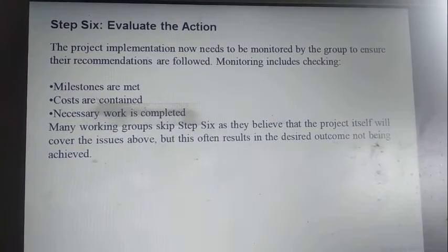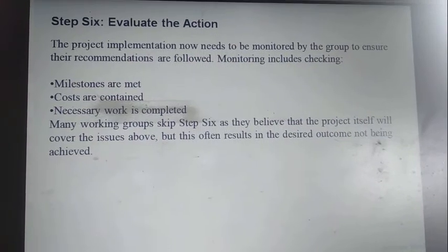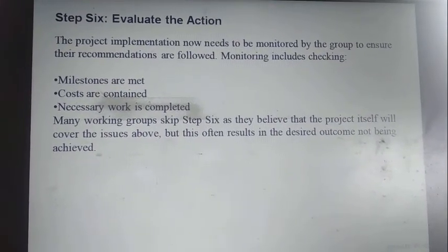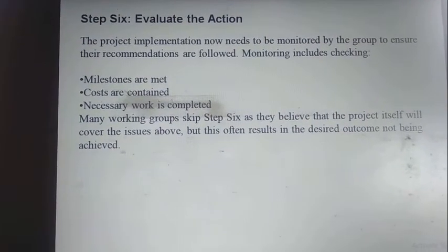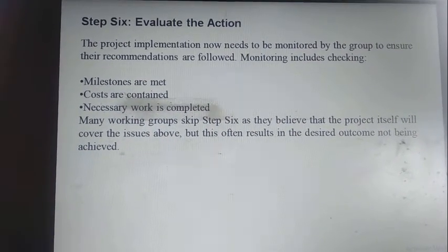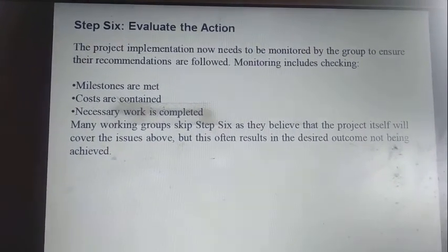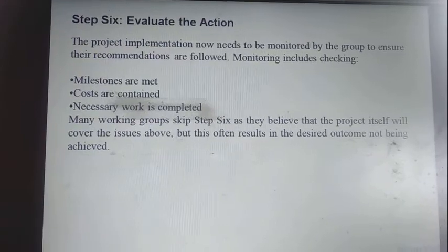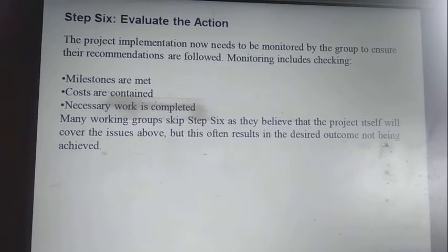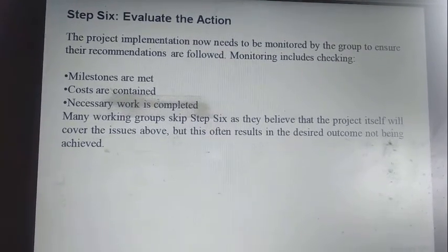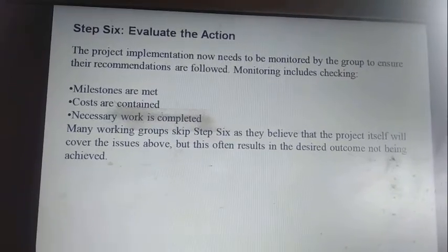The project implementation now needs to be monitored by the group to ensure their recommendations are followed. Monitoring includes checking whether milestones are met, costs are contained, and necessary work is completed. Many working groups skip step 6 as they believe the project itself will cover the issues above. But if they believe this, it often results in the desired outcome not being achieved.